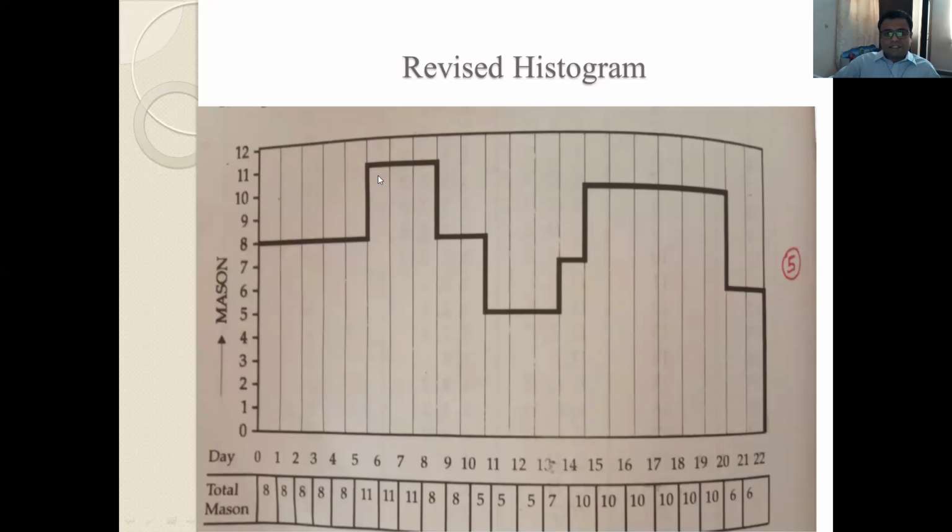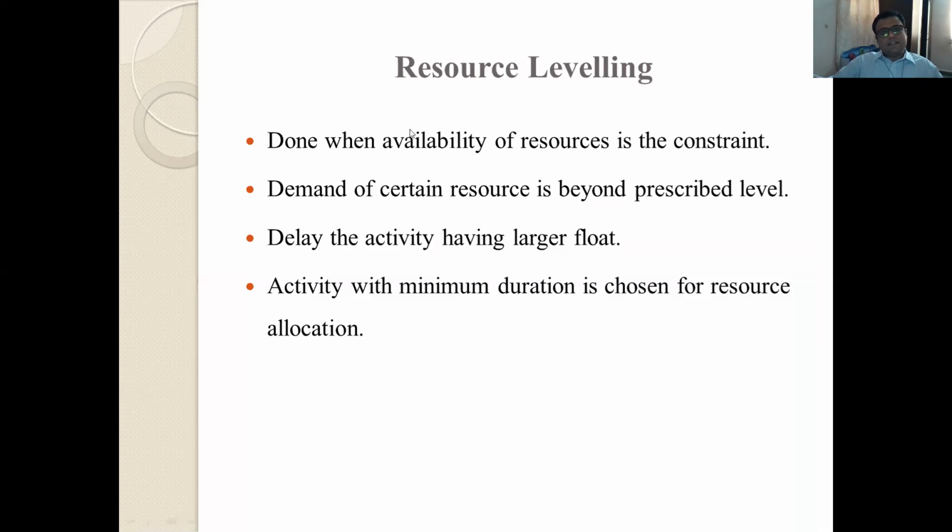Now we will repeat the same process, and please remember that it will be applicable for non-critical activities only. That is the constraint for resource smoothing. Okay, so this whole process is what is called resource smoothing. Okay, so we'll start with the next topic, resource leveling.